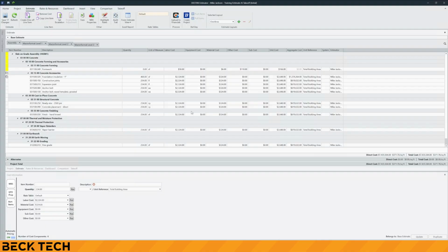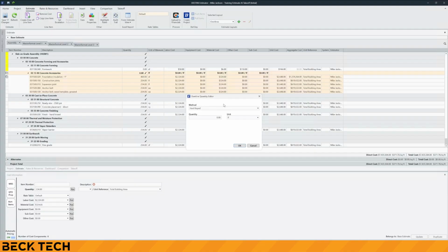First, how to access the Overline Quantity Editor. With your estimate open, navigate to the Estimate view. Make sure your Estimate view layout has the quantity column visible and a WBS grouping set. Right-click in the footer below the quantity column and select Show Overline Total. You will now see Pencil Edit buttons in the quantity column overlines. Click the pencil above the group for which you would like to display overlines. This will bring up the Overline Quantity Editor.